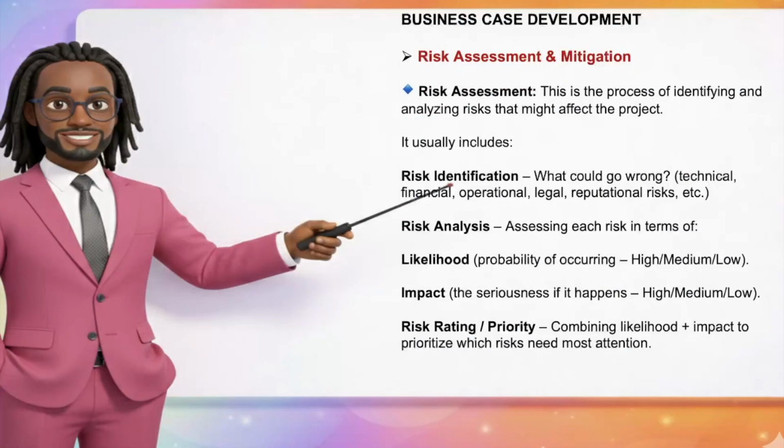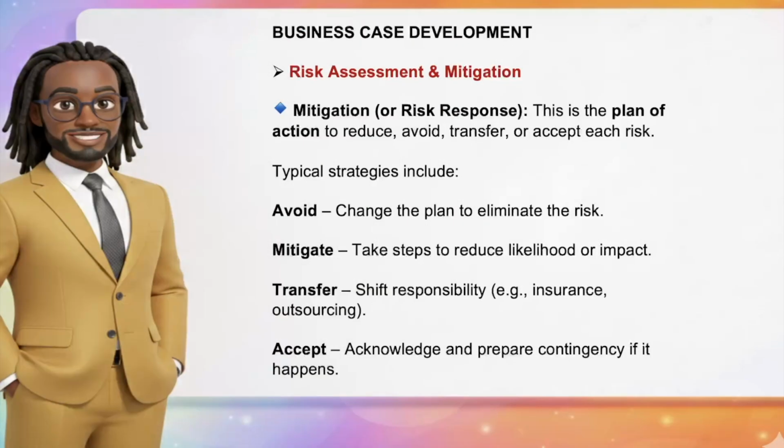Risk assessment and mitigations. Risk assessment involves identifying and analyzing potential risks: technical, financial, operational, and more. Each risk is assessed by likelihood and impact to prioritize attention. Mitigation is the plan of action to reduce, avoid, transfer, or accept each risk. Strategies include avoiding, mitigating, transferring, or accepting risk.